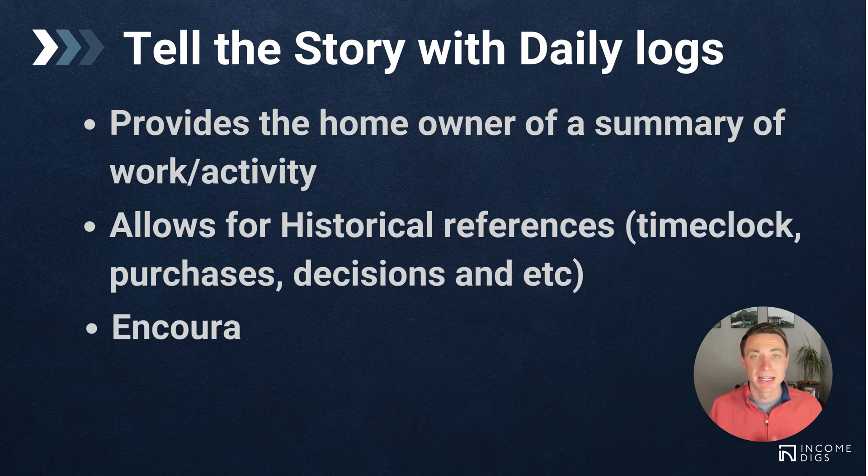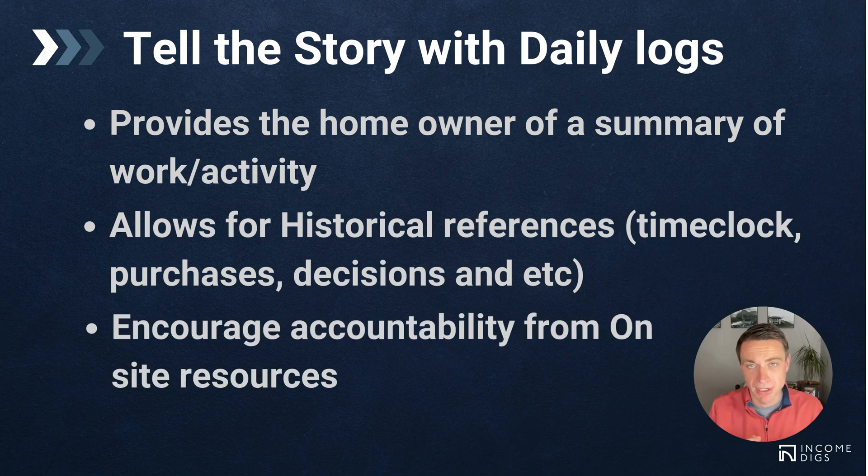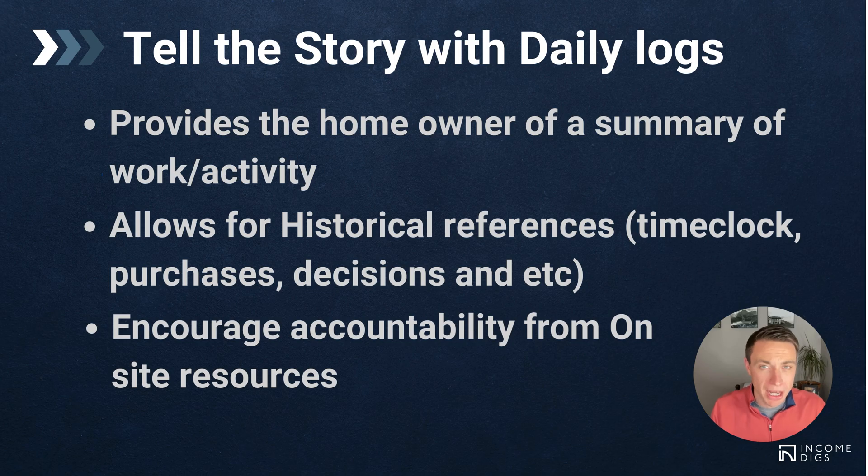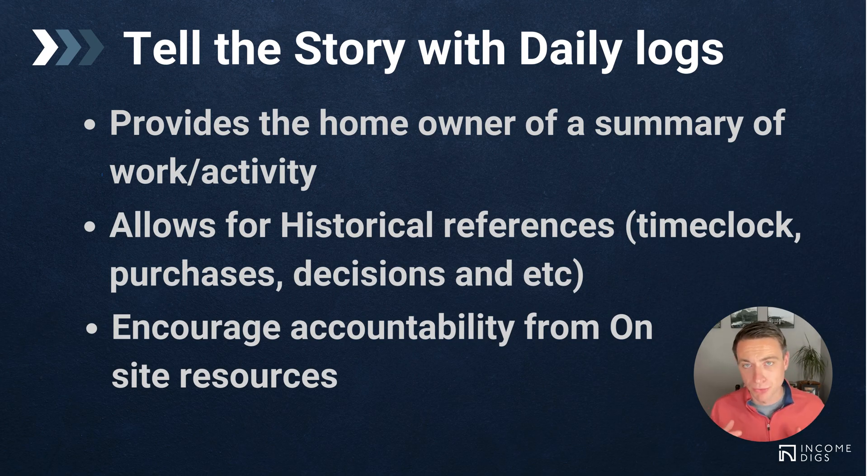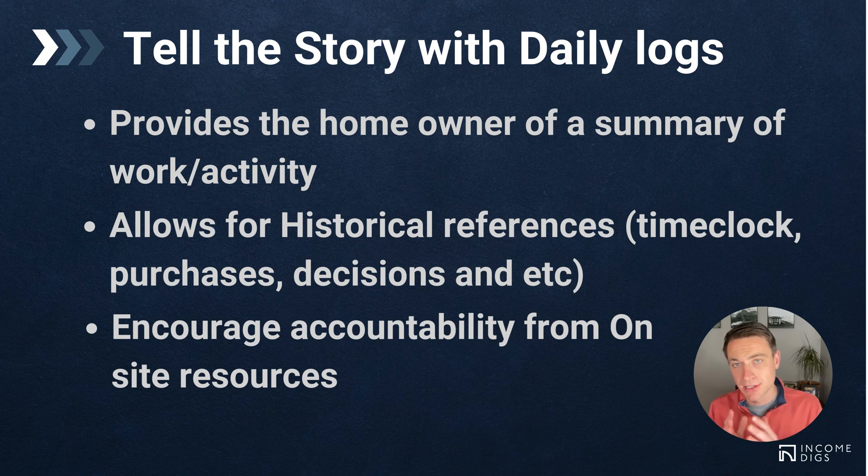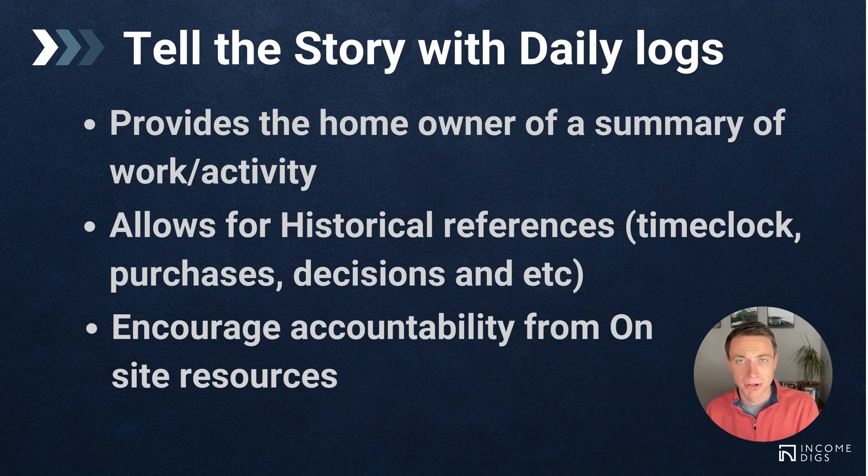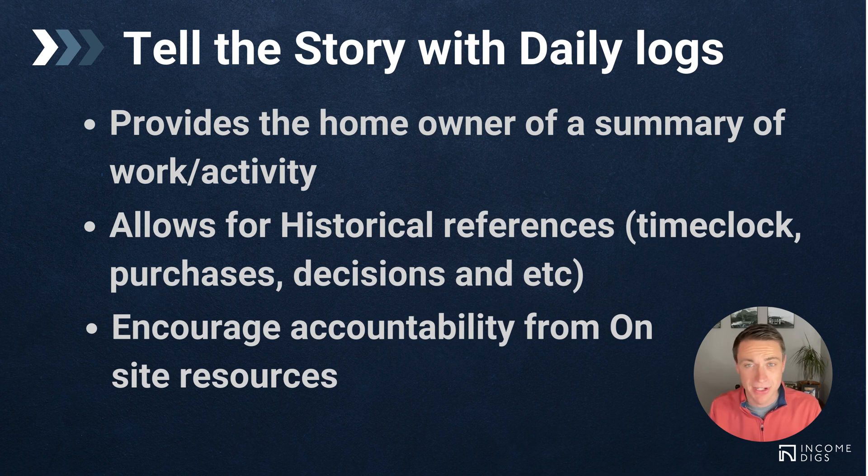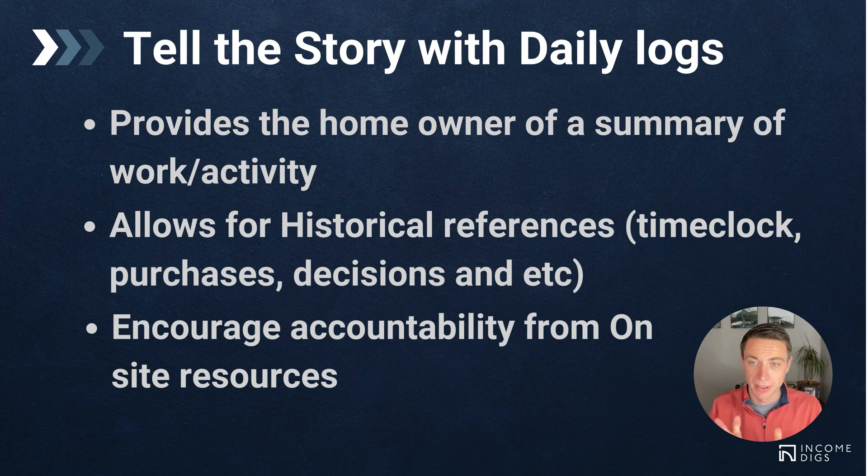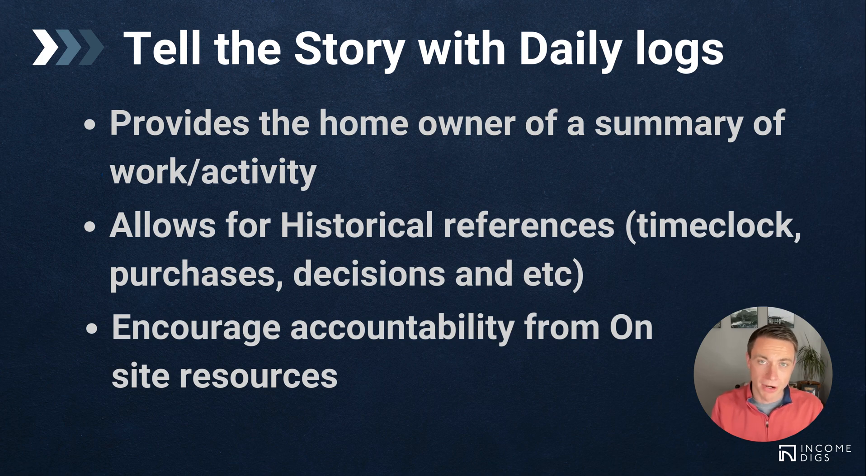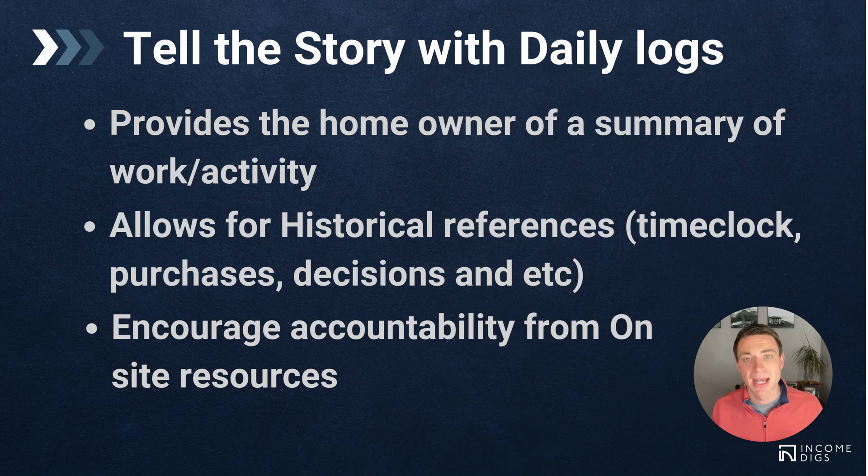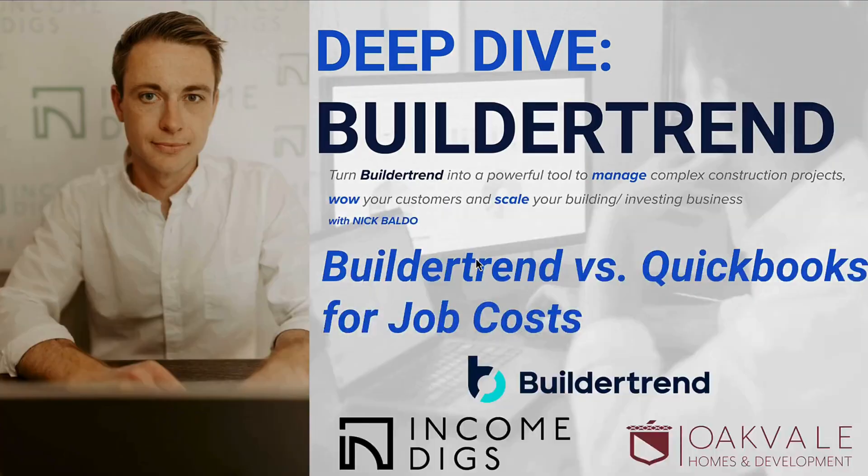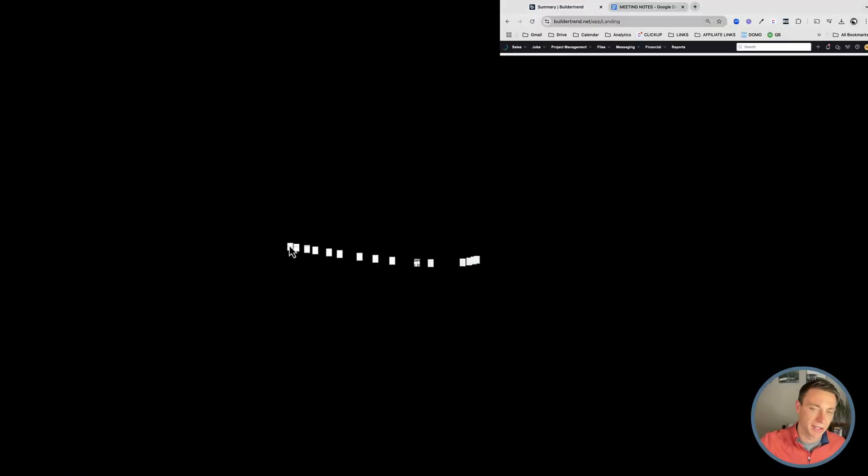Lastly, it encourages accountability for our on-site resources. For those of you who have a project manager model or a lead carpenter model, and you want to have some accountability on the job site, it's really a great idea to assign a daily log to a lead carpenter, to a project manager. I like to have 100% compliance that we try to have a daily log on every single workday, even if that means we weren't working. Lead carpenter is accountable to do it, but if they're not there because there's no work going on, they can either add it, or a project manager, a production manager, somebody has to add it so that we feel really confident that we have 100% daily log compliance. So that's the way that I do it. Let's get into BuilderTrend. I'll show you what these are.